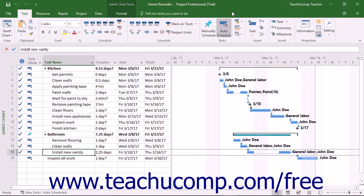One of the many benefits of project management is the ability to perform earned value analysis, also often called earned value management. This type of analysis lets you view project statistics that reveal the overall health of the project in terms of time and cost. It also helps reveal trends that can indicate the eventual success or failure of the project. When you view earned value analysis data in a project file, you compare figures from a specified date against figures from one of the baselines you saved in the project file.